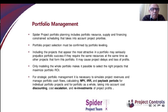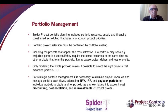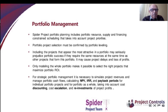Spider Project's portfolio planning includes resource supply and financing constraint scheduling, taking into account project priorities. The same methods applied to individual projects are applied to portfolio management. It is necessary to manage portfolio cash flow and account for all constraints when selecting and managing projects. For strategic project planning, Spider Project can calculate net present value and total rate of return, consider cost discounting, cost escalation, and the possibility of reinvestment.